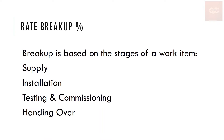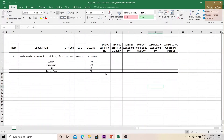What we mean by rate breakup percentage is basically a breakup given for each stage of a work item. Normally any work will have stages such as supply, installation, testing and commissioning, and finally handing over. Every item of work in your project will have all these stages, and a breakup percentage is given for each stage. We'll understand this more clearly with an example.